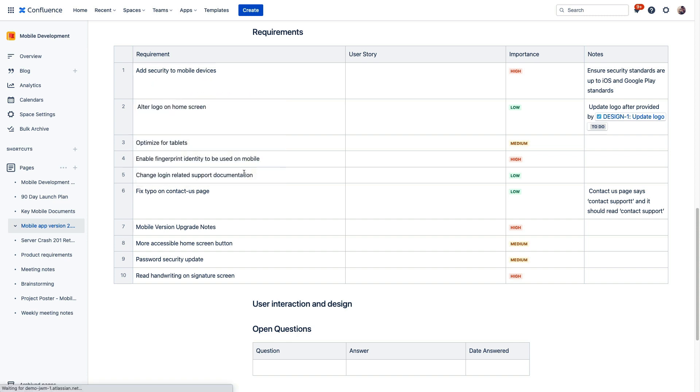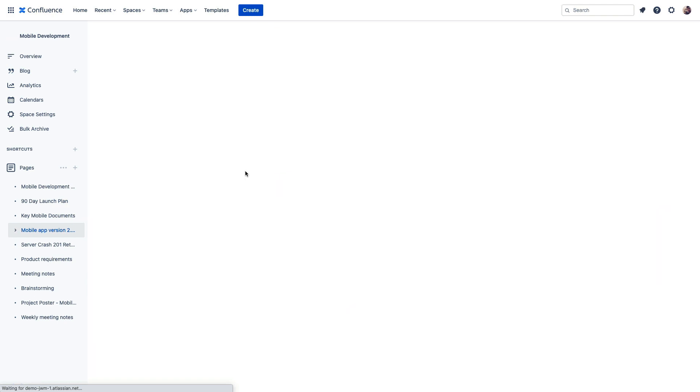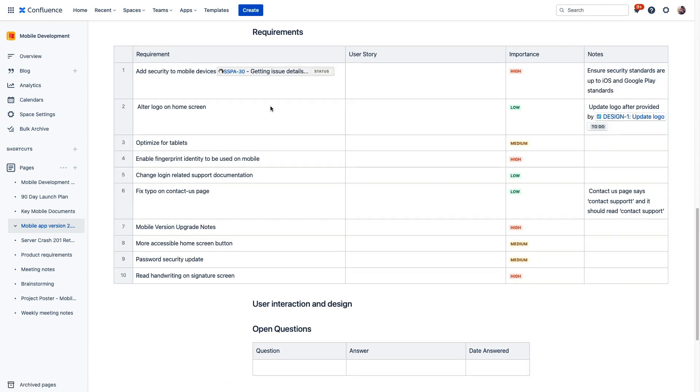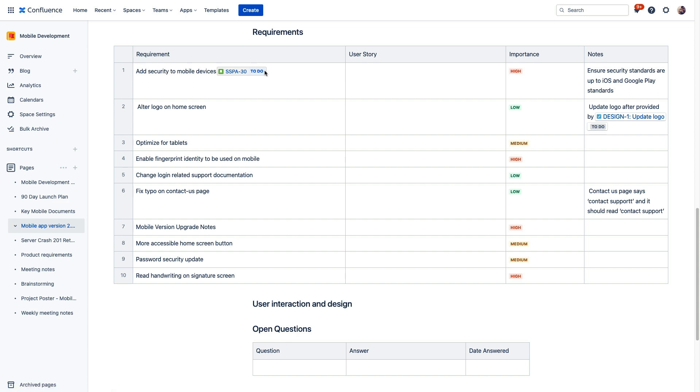So after this refreshes, right here from our planning space, we have created our work item with a link that's already embedded into our Confluence page. So as this issue moves through the Jira workflow, you'll see it change here as well, seeing its current status listed right here.